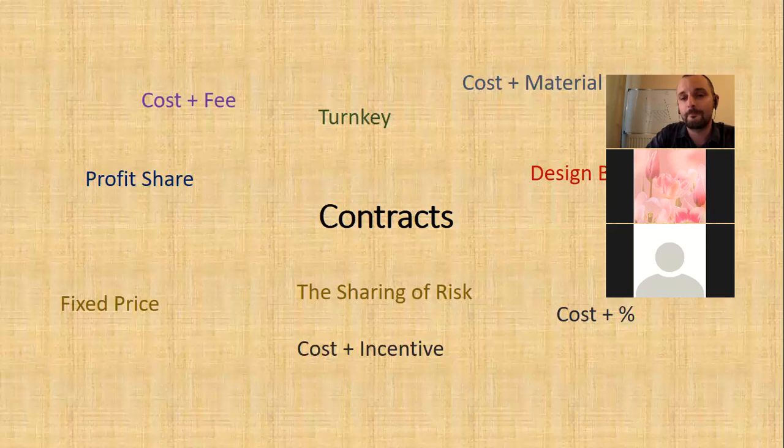And so basically you say, I will pay you, for example, $1,000 for every early delivery. So we agree that you will pay it. I will pay you this much. You need to finish it by this date, but I'm going to pay you an extra 5% for every week you finish early. So that encourages the person to work faster. Yes. And generally, carrots work better than sticks.